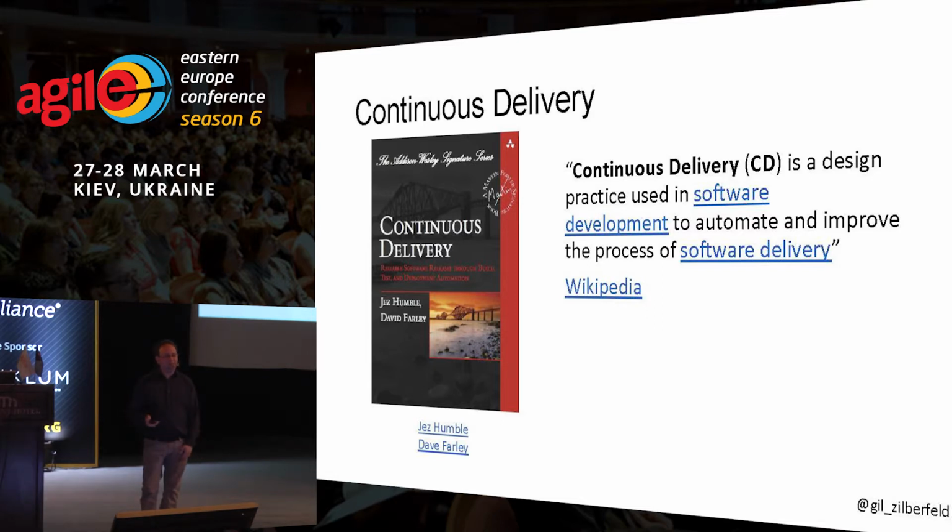I think we were able to squeeze a release every 6 or 8 months. And then we started to improve. And we actually got to a point where we could create an installer in less than a month, I think. This was considered a big success for us. Now, the thing is that we were thinking about ourselves, because now we were able to release every month. But who got this installer? The verification team who actually tested the whole system together. And they had a cycle of testing of 3 months.